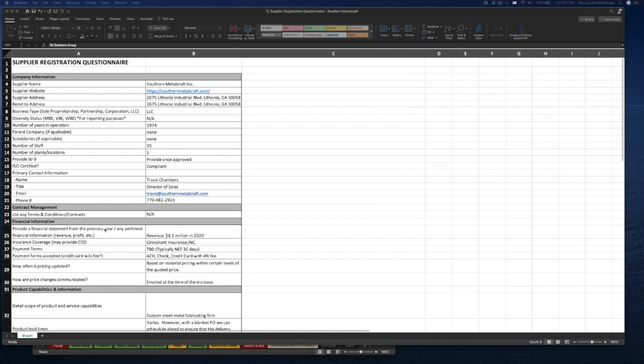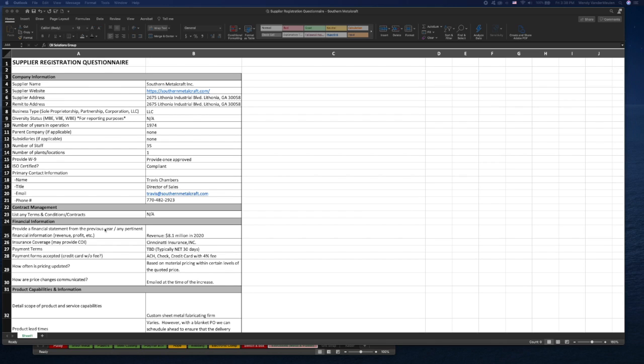I've used this on most of the suppliers that we've sourced our pool cover products from thus far, and it helps us to get to know the suppliers better and ensure they have the capabilities and quality we'd like to see. We've used this information, along with pricing and lead time, to make our supplier selections.